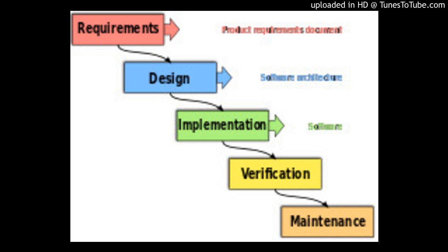The rapid development process starts with the development of preliminary data models and business process models using structured techniques. In the next stage, requirements are verified using prototyping, eventually to refine the data and process models. These stages are repeated iteratively. Further development results in a combined business requirements and technical design statement to be used for constructing new systems.